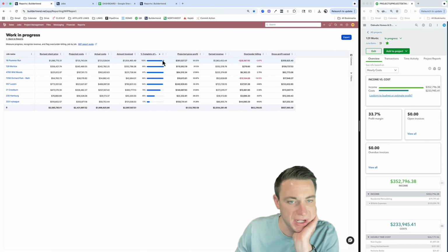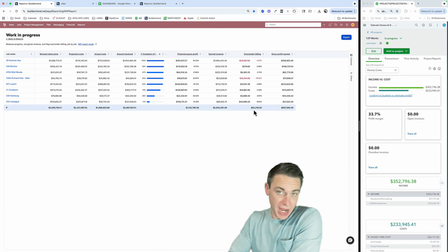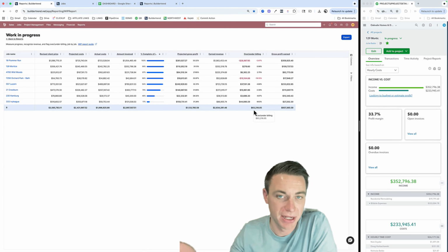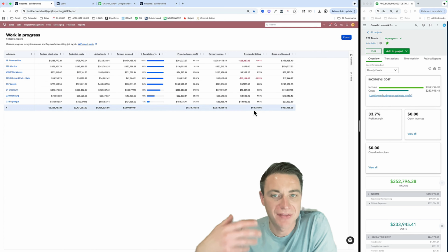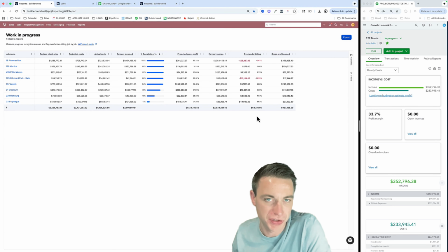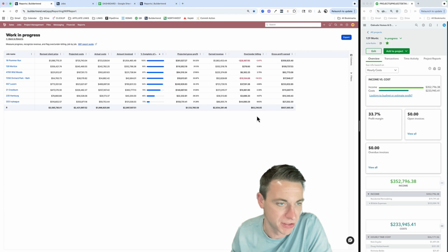And so what this does is it tells me generally I'm overbilled. Now, again, operationally, that's a good idea. We want to be over-invoicing so that we get cash ahead of time and then we pay our contractors for it. But we have to keep in mind that I'm kind of like $63,000 that I might be showing in revenue right now, I have to assume that's kind of out the door because that's going to kind of come back as costs incur. I can't invoice my customers again for them.